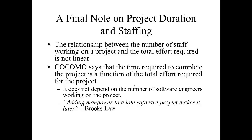A final note on project duration and staffing: the relationship between the number of staff working on a project and the total effort required is definitely not linear. COCOMO says the time required to complete the project is a function of total effort, not the number of software engineers working on it. The famous law from Fred Brooks is: adding manpower to a late project makes it later — known as Brooks' Law. That's it for the software engineering side; a related lecture will cover how businesses and management information systems deal with this aspect of software engineering and implementation.